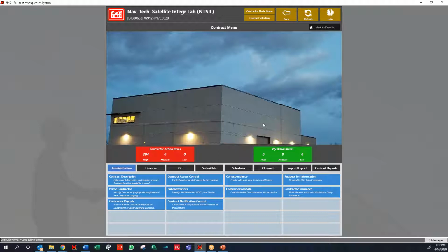So our pay application process, as we know, is based on work percentages complete in the field. What is our physical work complete? They're usually done month to month. Sometimes it slips, goes longer. Very rarely do we get the opportunity to do multiple in a month, but sometimes it does happen. In the government world, especially Corps, those are usually dictated by the schedule. Now, you can do some smaller projects to where the schedule is not being used as such, and there are options for that, but those are pretty much under $200,000 contracts.